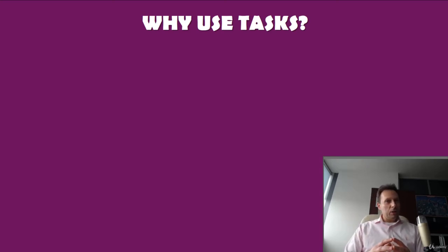Although the Scrum Guide does not specifically refer to tasks, it does say work planned for the first day of the sprint by developers is decomposed, often to units of one day or less. Defining these small units of work as a task and limiting them to a day or less can help developers create flow with focused, uninterrupted time. Tasks are the smallest unit of work. One person on a team should complete a task, and developers may choose to pair up when doing the work. Typically, each user story will have multiple associated tasks.